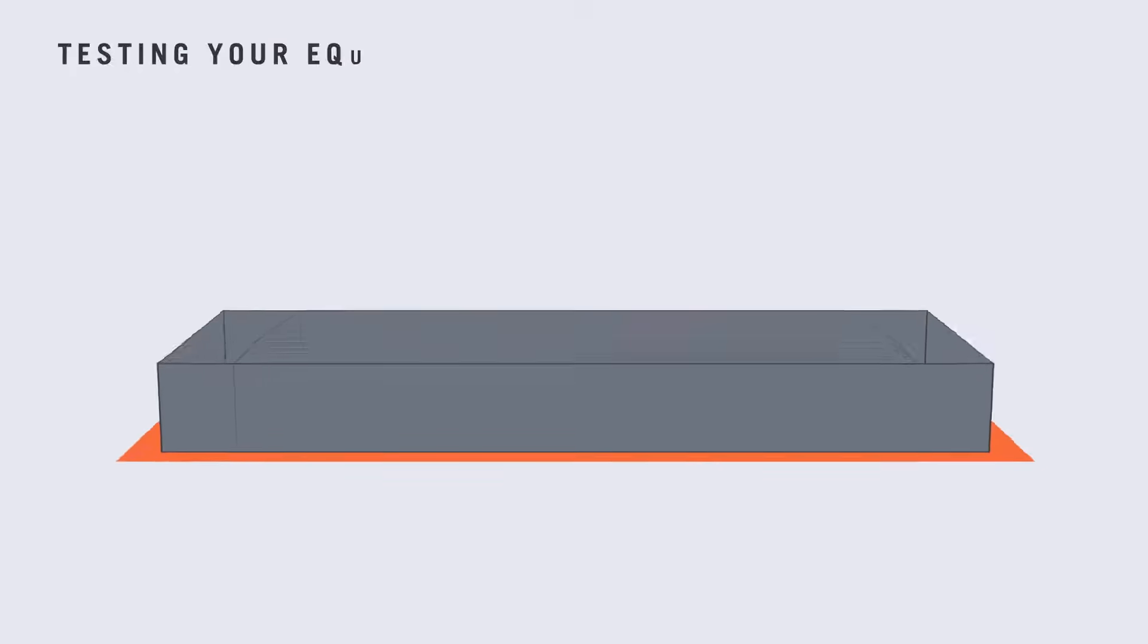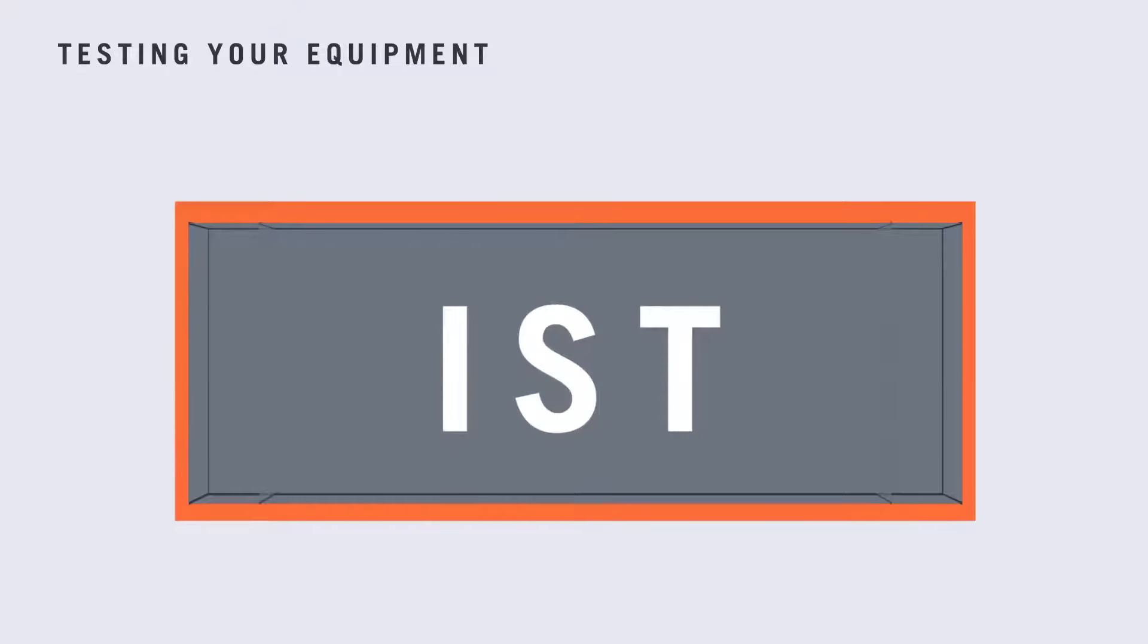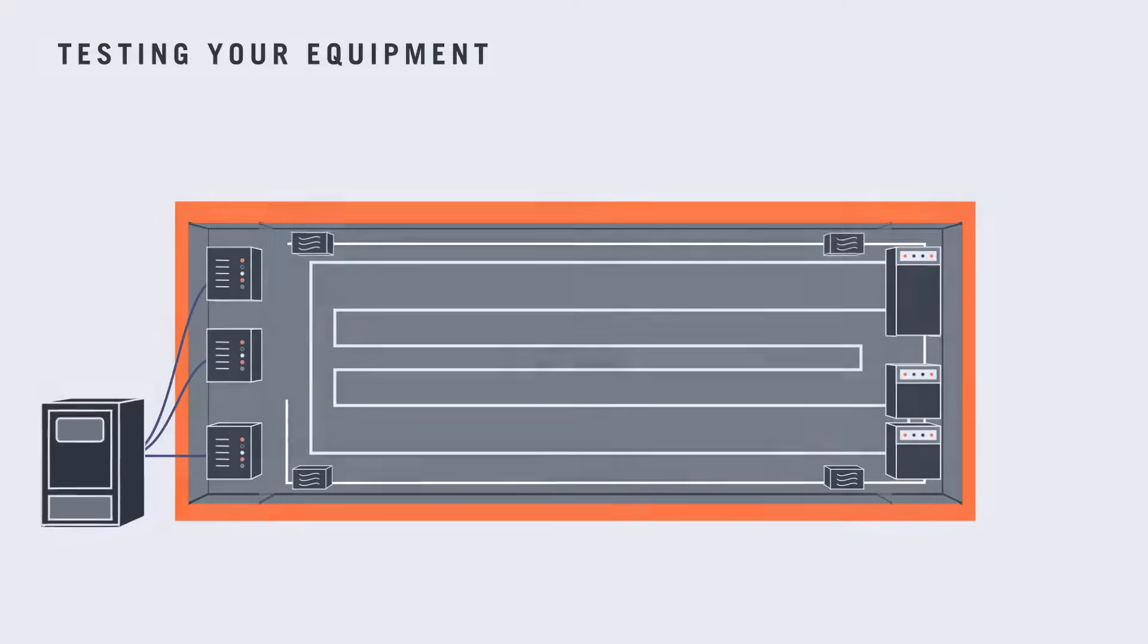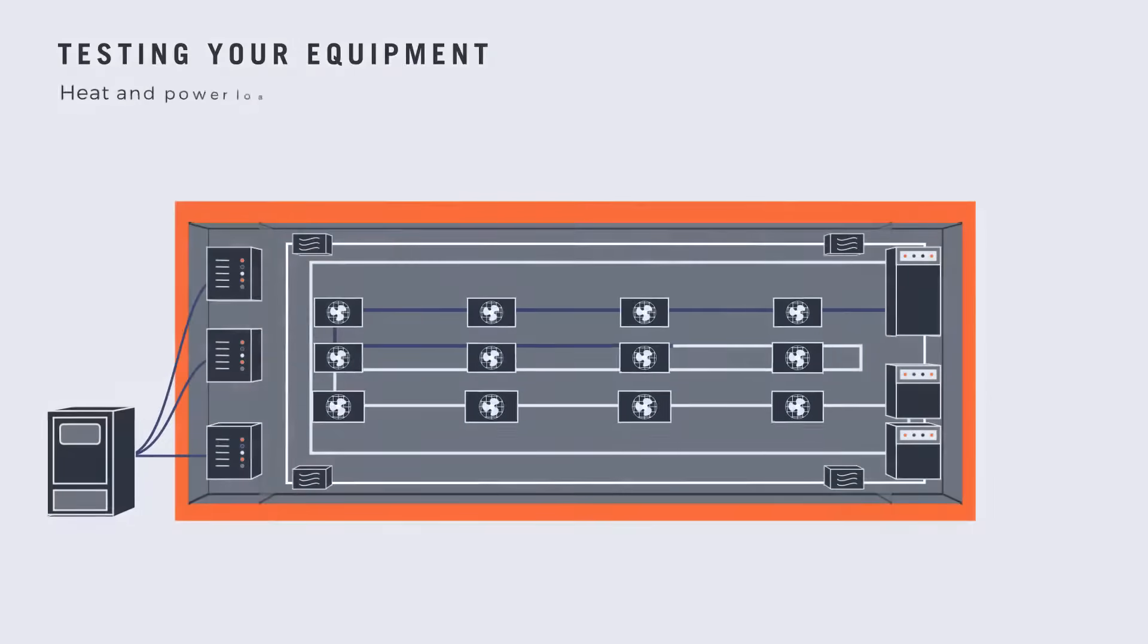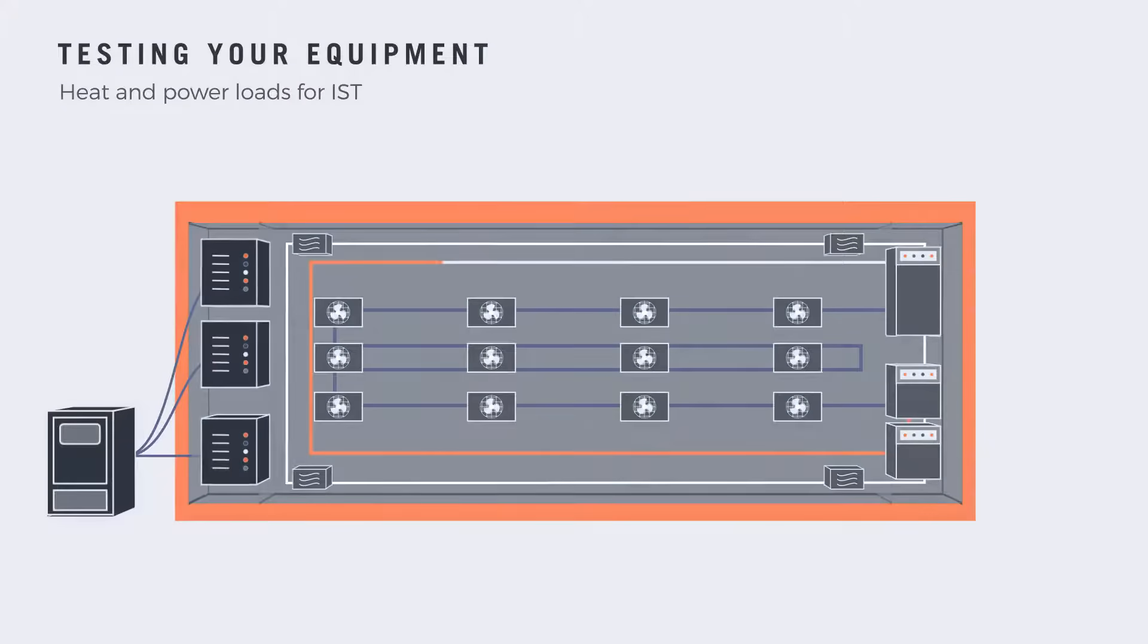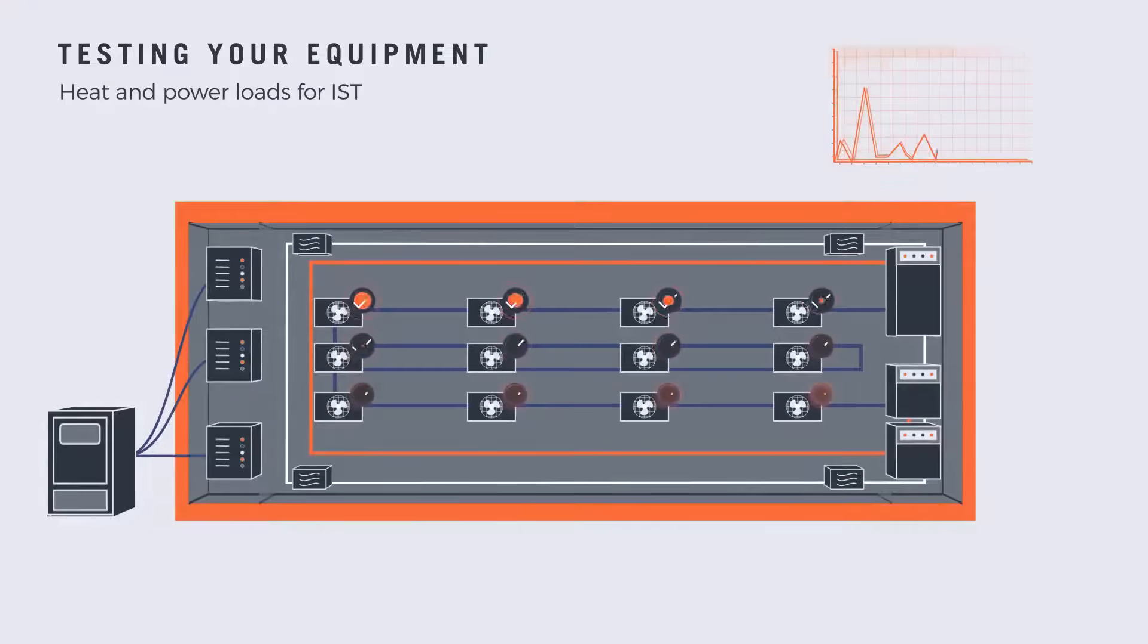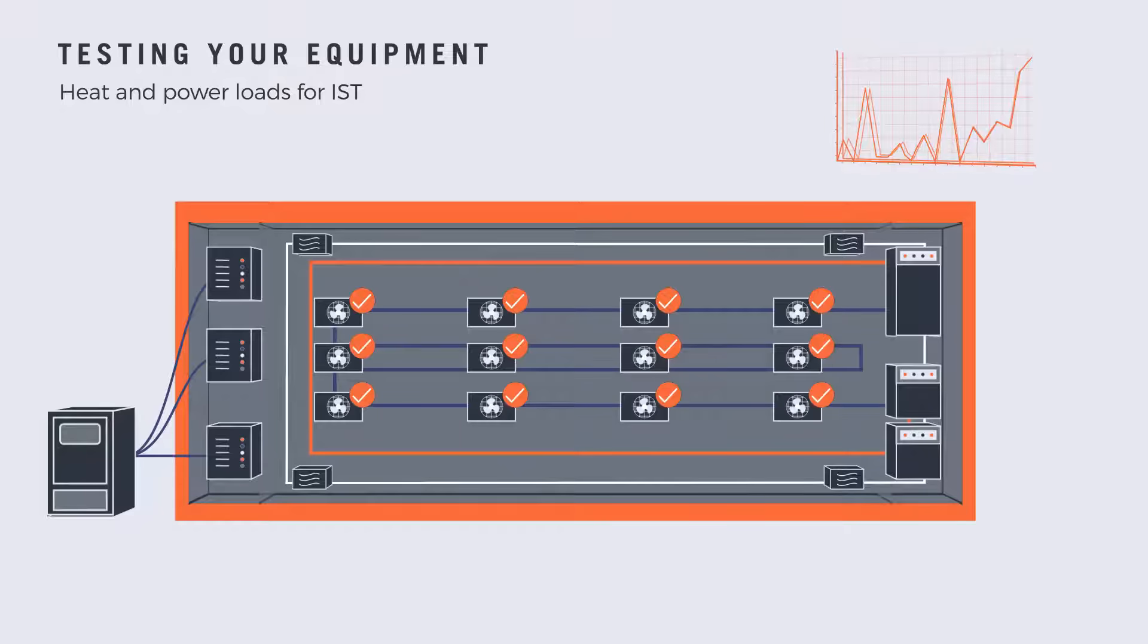And when it's all up, we're here to help you test it all. Our load banks can simulate the scenarios your data center will face, be it testing your standby generation, your UPS, your bus bars, and full electrical pathway from the racks back to the mains incomer. We also simulate the heat generated by the IT equipment to help you test your cooling system to the full.